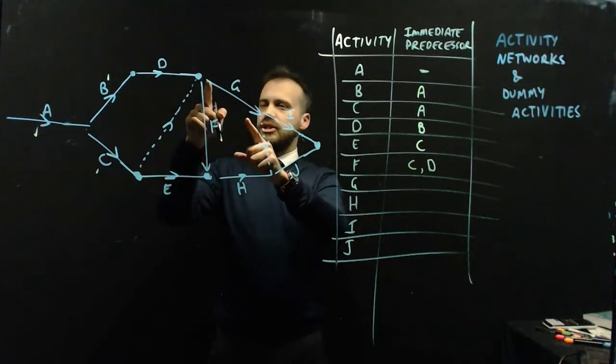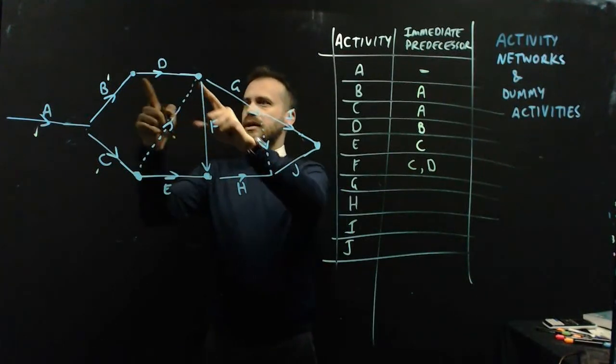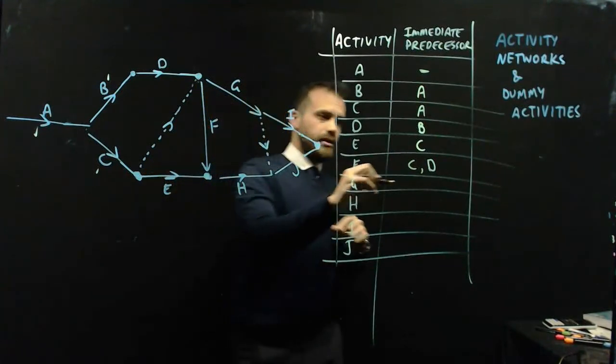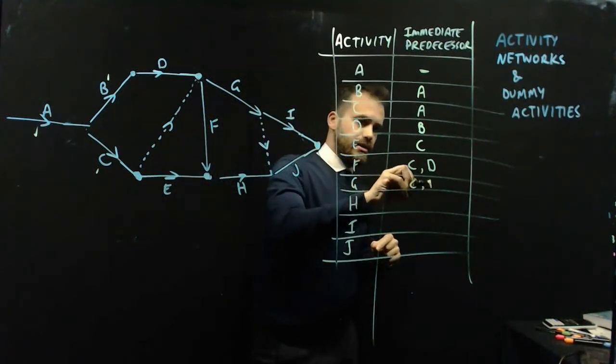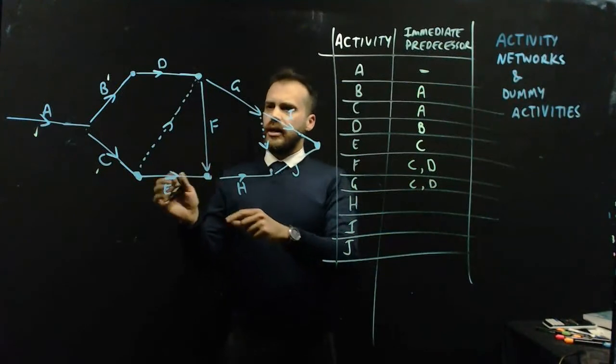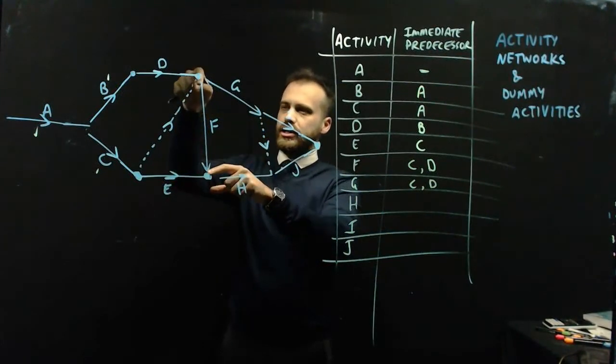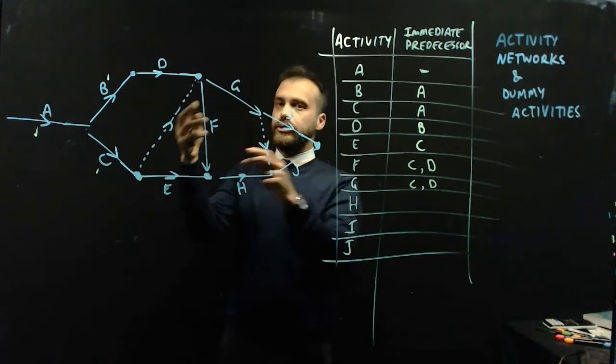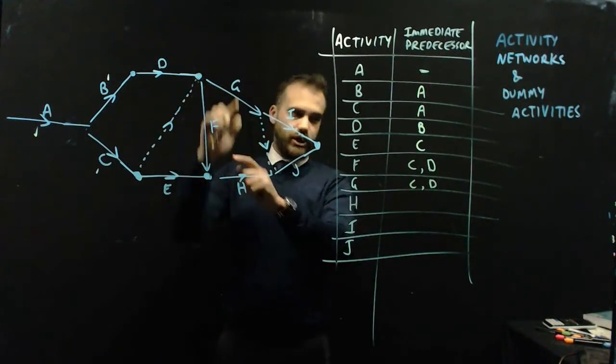What about G? Before G, we have to do D and this dummy activity which is C. C and D. Now, you might be looking at F. But F is not before G. F is like before or during or concurrent with G.